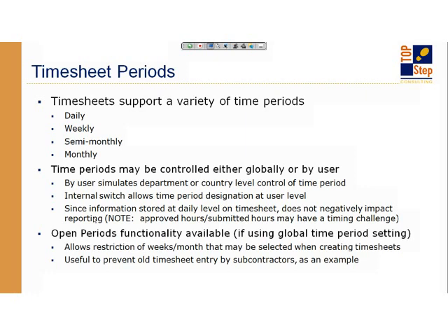If you have weekly timesheets due, you tend to get time entry more consistently than when you have monthly timesheets due, and then people will fill their timesheet in at the end of the month. So you don't necessarily get actuals on timesheets throughout the month. But you definitely can set different time periods in the system and have different organizations or companies use different time periods. A single person can only have one time period though, so you're either a weekly person, a semi-monthly person, or a monthly person, but it's still a flexibility that a lot of people are not aware of.